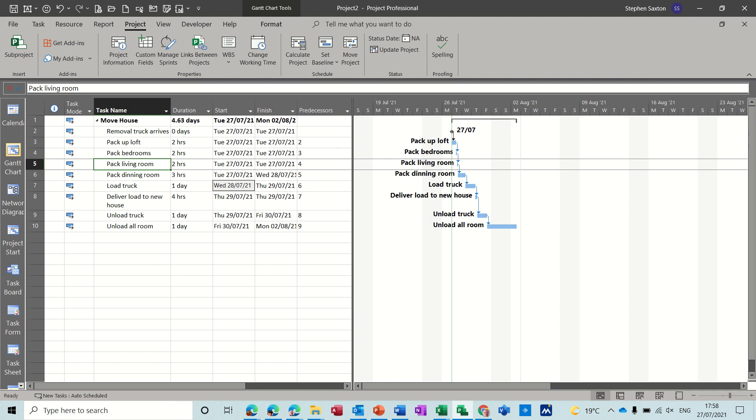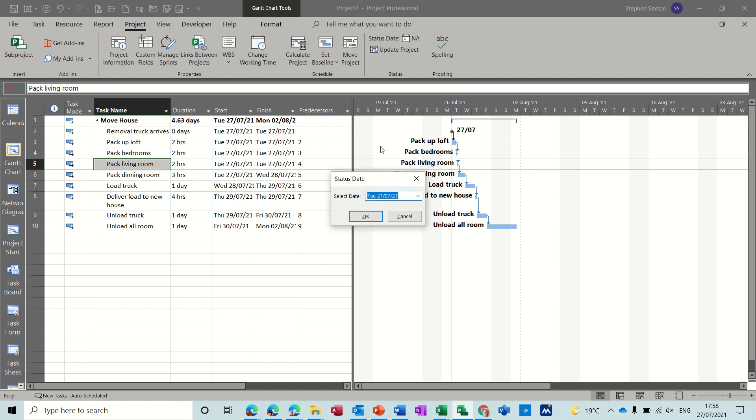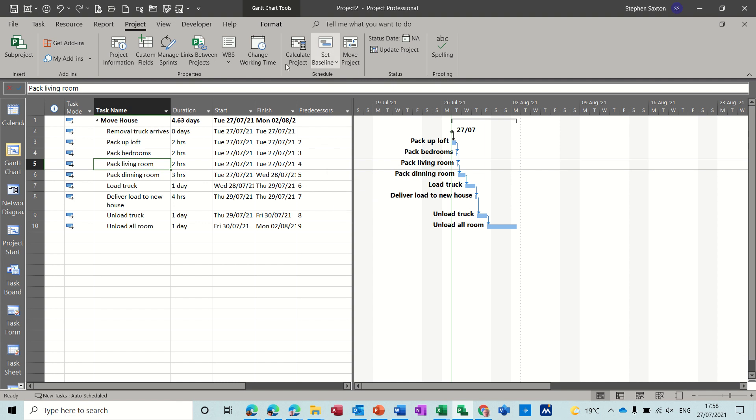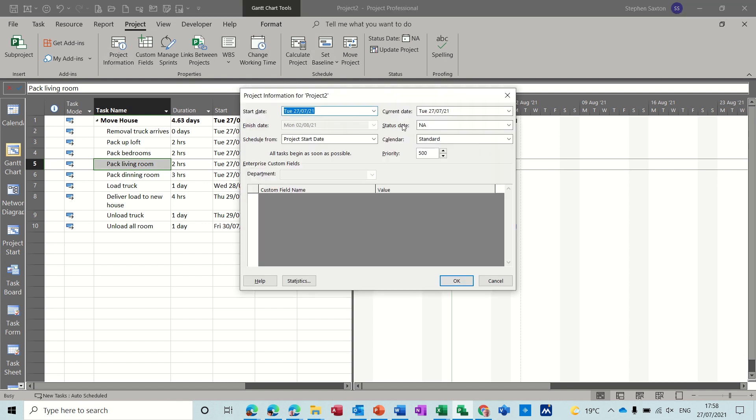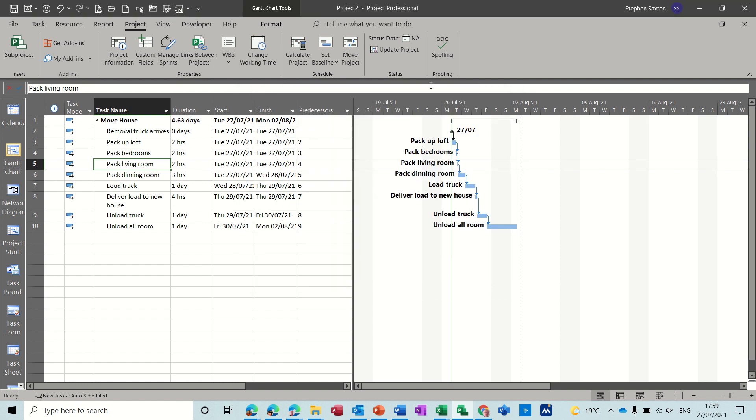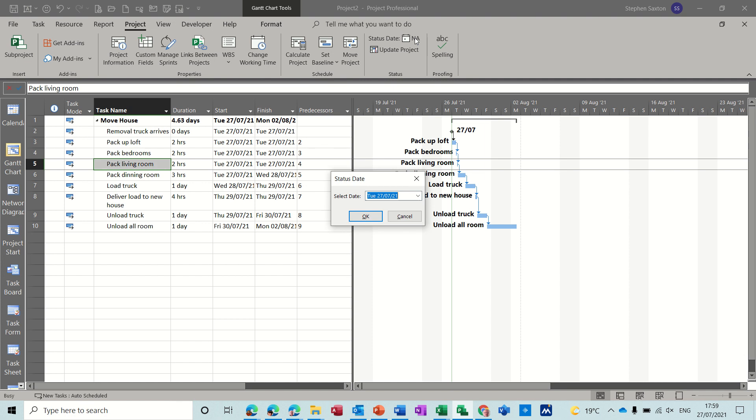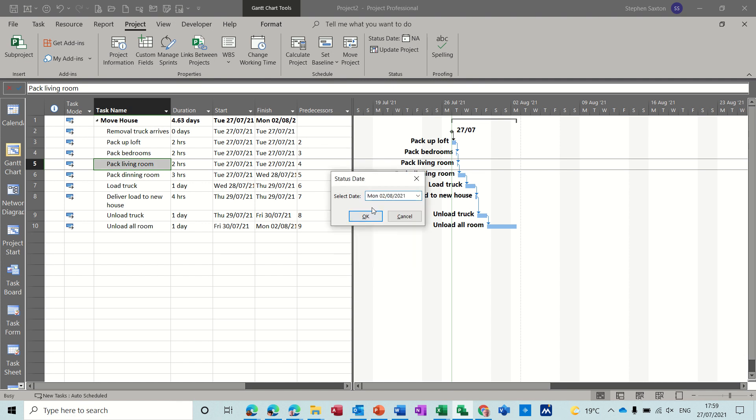So first of all let's have a look at the status date. Now on the project tab you have on the right hand side the status date where you can put a date in there. If you go into project information you can also set that status date in this box. Now if you don't have a status date, project uses today as the status date, but I'm going to set a status date in this box for the 2nd of August which is next Monday.